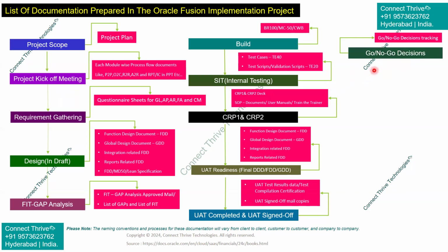Okay, so once we get a go for confirmation of go live, then we have the cutover stage. There we will prepare the cutover task plan. So what tasks we are going to start, what is the dependent task, what is the independent task, who is going to deploy the respective task in the production environment, which time zone the consultant is working in, what is the starting time, and what is the ending time.